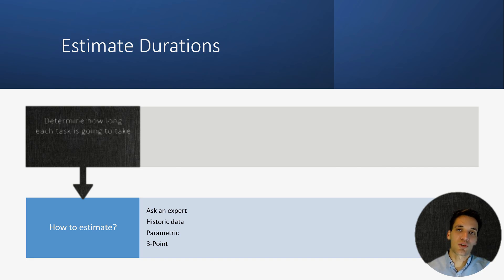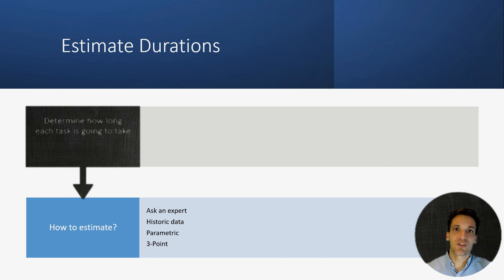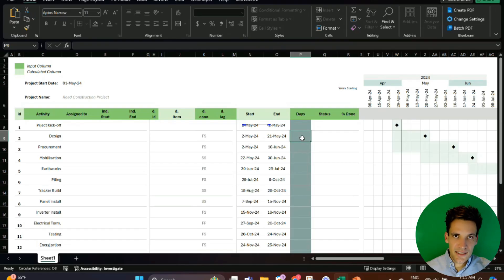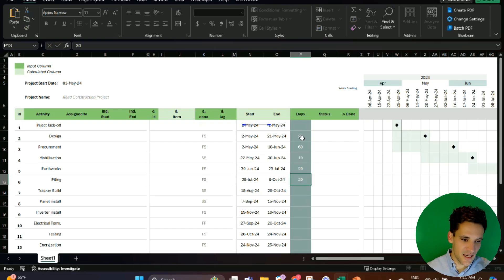The final approach is three-point estimating, where we estimate the duration of a task based on three separate estimates — a worst-case, a normal case, and a best case — and take a weighted average of the three. There are lots of different ways to do it, but ultimately the purpose of this step is to make an accurate estimate of the task duration. The next step is to go through and enter each of these individual durations in the Gantt chart — put in the duration in days that you think each task is going to take.